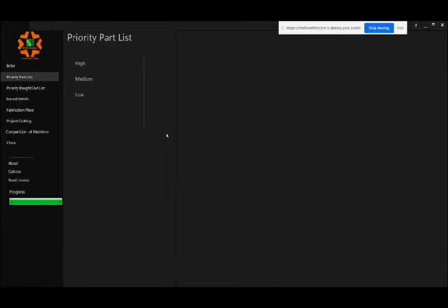Now for avoiding project delays, what we normally do is we plan to get the items taking longer lead time manufactured first, right? Items which may take longer time to get manufactured would be my first priority or high priority item. Since we need some buffer on that, we can start planning our fabrication and reduce our chances of getting delays.